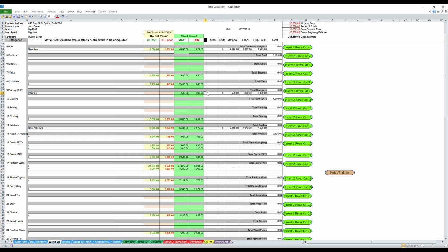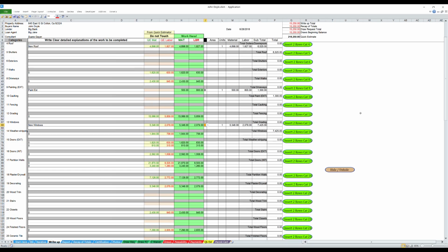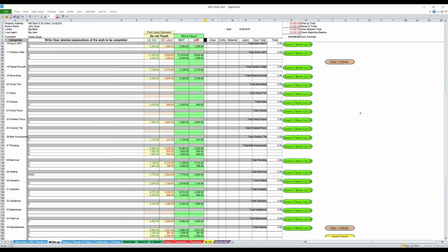Here, is it a required item? Yes, no. In this case, it's desired. So if we get down to the point where the budget is really tight, we can eliminate that item. It's not a critical item, but the windows, they're all bad. We got to get them all done. So we're going to make it required. Shows up in a red X so that they don't miss it. This item cannot be taken out of the work write-up.